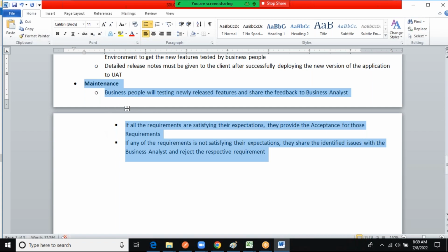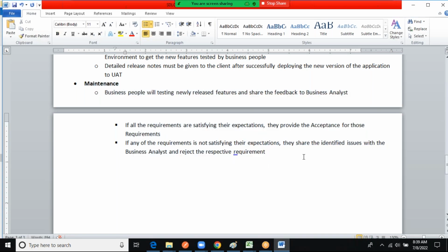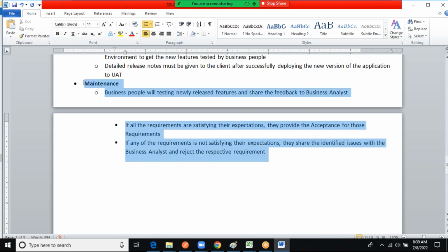They don't keep all 10 developers and all 5 testers in the project. They remove everyone and keep 2 developers and 1 tester, a limited number of resources, for maintenance for 1 year. Depending on the client's agreement, it can be 1 year, 6 months or 3 months of maintenance after completing the full development of the product. Understand?